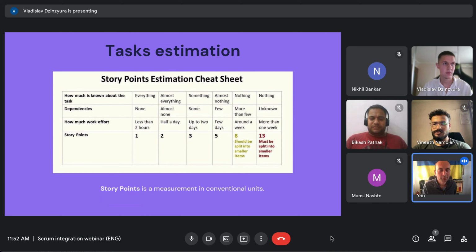Another thing about story points which I learned, just as a side comment, is that starting from some moment, it becomes more and more difficult to estimate tasks precisely. For example, if you estimate some small task, under 1 day, like a 1 hour or 2 hour task, then most developers will estimate it correctly. The estimation error will be small.